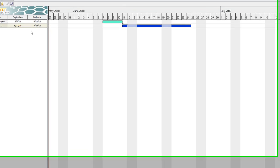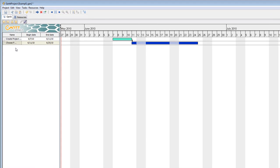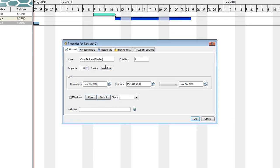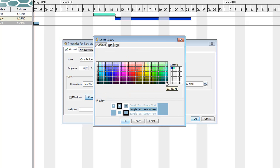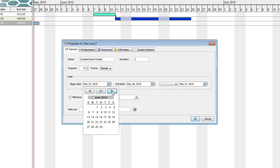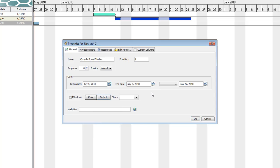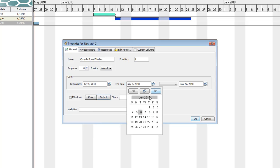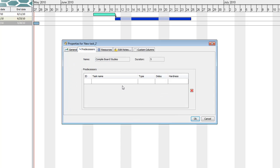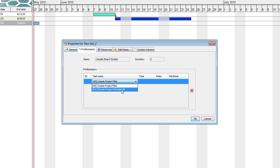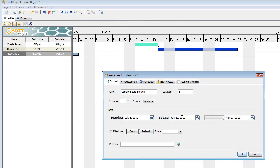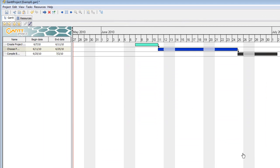Let's try one more. Going to double click. Up pops the box. I'm going to type in compile board studies. I'm going to choose a color, let's say black. OK. I'm going to give a July start date, and let's just make this one week in duration. I want the predecessor to be the very last job. So I'll go to the predecessors tab. Click there. Choose the predecessor that I want it connected to. Go back to general, make sure everything is OK, and finally press OK.